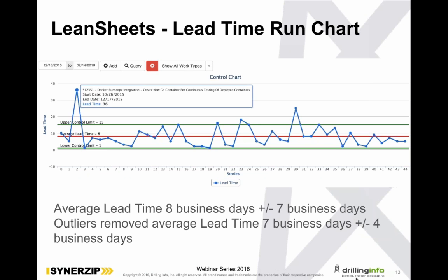And this is probably the most popular graph that we have. Pretty much all the managers are using it to see outliers. We call an outlier anything that's above that green line, and we want to try to understand why it is an outlier. Why did it take so long? What we're finding is people are starting things a lot sooner and not having the dependencies resolved before they start, so it gets blocked and becomes an outlier. And as a result, the behavior is changing to, hey, have all the dependencies been done?